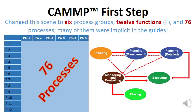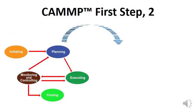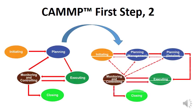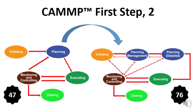The vast majority of those processes are implicit in the PMBOK guide or ISO but not mentioned explicitly, and some are due to the additional process group and the two additional functions. So now we have six process groups, 12 functions, and 76 processes. In the planning area, the PMBOK guide's planning processes have been split into two separate process groups: management planning — developing the detail plan to guide us on how to manage and control the project — and a detailed plan that includes more product-oriented processes such as detailed scope of work, detailed scheduling, and so forth. The CAMP model thus transforms from five to six process groups, 10 to 12 functions, and 47 to 76 processes.